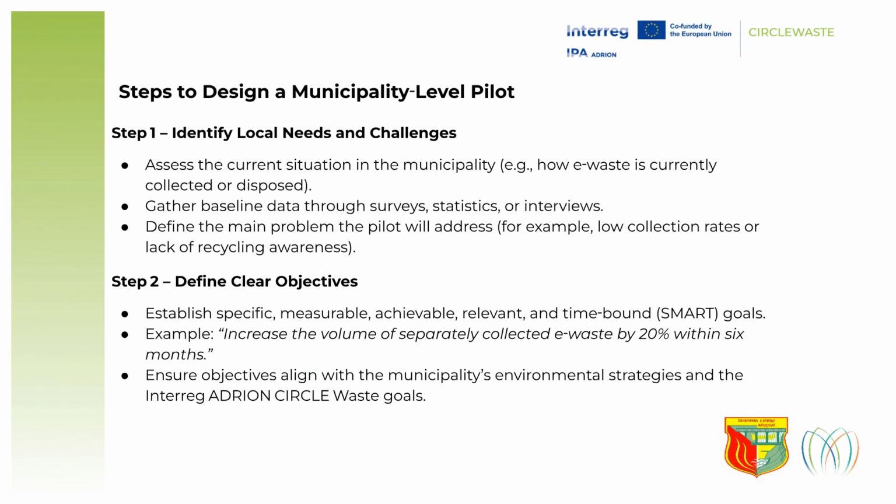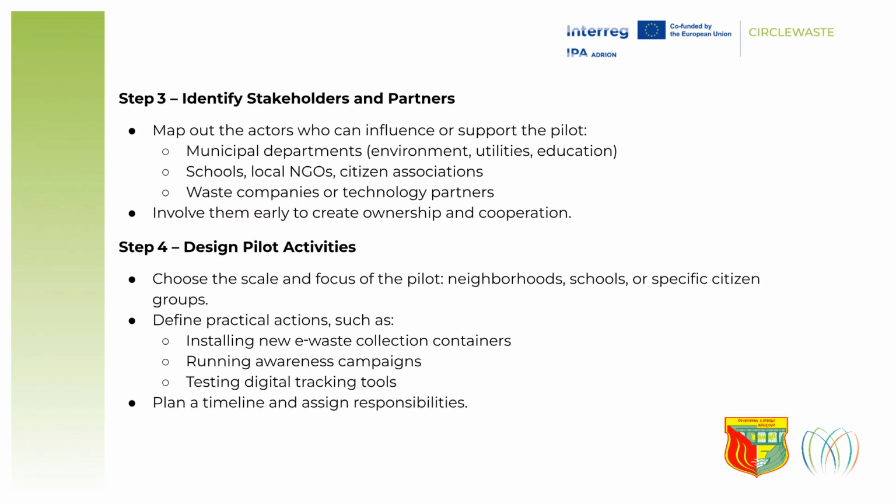Step 1 in designing a pilot is to identify local needs and challenges, which involves assessing the current situation and defining the main problem. Step 2 is to define clear, smart objectives that align with the municipality's environmental strategies and the project goals. Step 3 involves identifying and mapping out stakeholders and partners, such as municipal departments, schools, NGOs, and waste companies. Involve them early to foster cooperation.